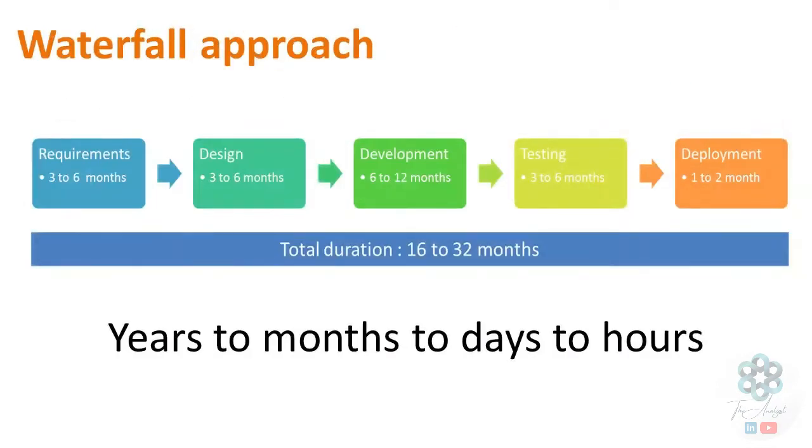In the Waterfall approach, we gather all requirements, do complete design, complete development, complete testing, and then deployment. Waterfall projects typically have a dedicated requirements phase. This may be anywhere between 3 months to 6 months. A similar amount of time would be spent on the design phase.